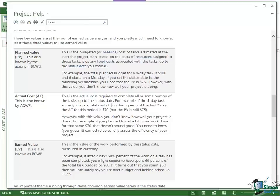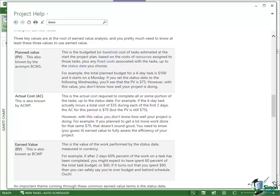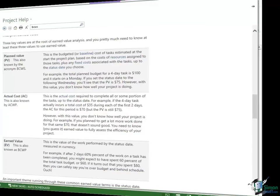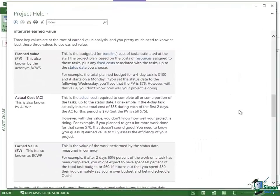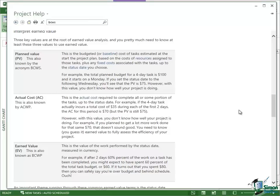We're going to start with three terms that are fully explained in the Microsoft Project Help. I'm not going to go through them all now: PV, AC, and EV. These correspond to the old terms, the ones that were used in the earlier days of Earned Value Analysis and which you'll very often see still: BCWS, ACWP, and BCWP. In many ways looking at the old terms does help to explain these terms more fully. But I'm generally going to refer to the new terms beyond this point because the new terms trip a little bit more easily off the tongue and in many ways they also encapsulate what they mean.